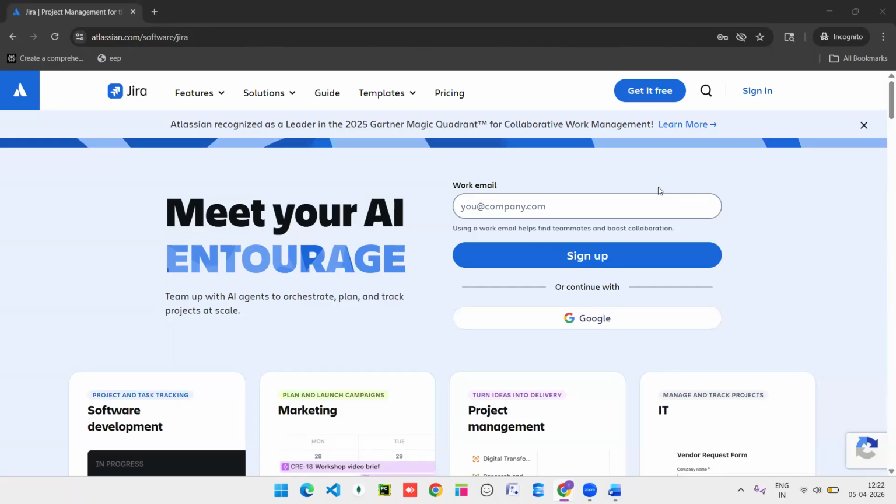I will divide them into 3 sprints, or 4 sprints, with 5 user stories in each sprint. In the first sprint, those 5 user stories will be completed with development, testing, UAT and feedback. Everything will be completed.